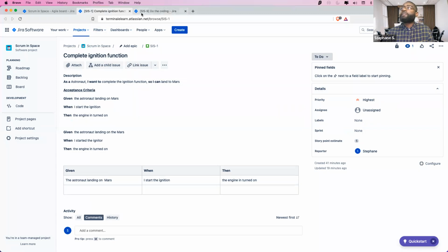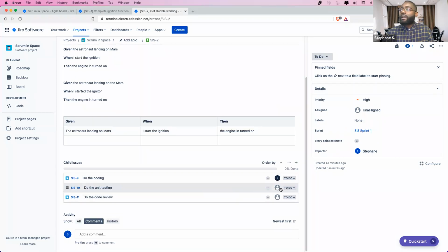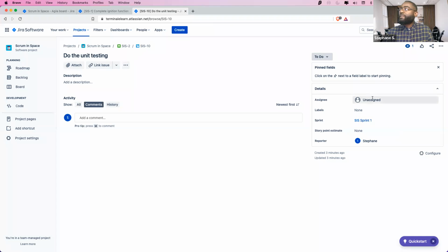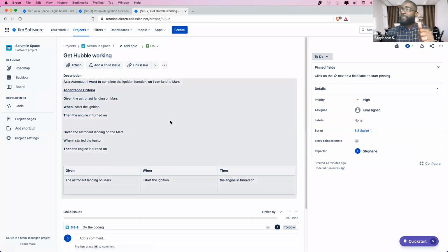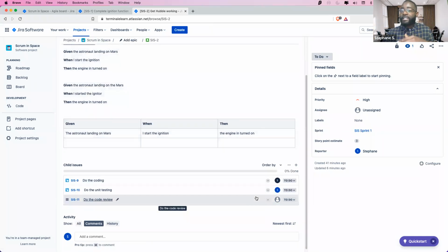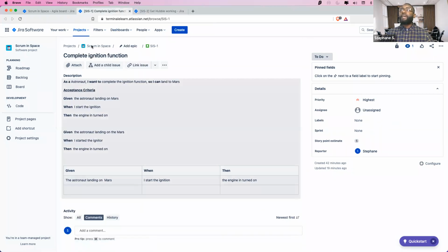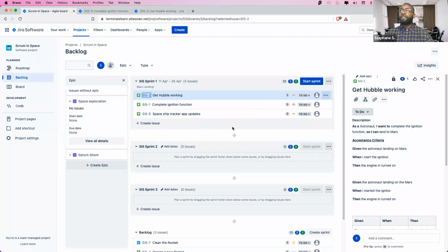What you see here, you have 3 subtasks, and then we assigned, at least we're going to assign it to different people. Okay, so that's what you're doing in the planning. So at the end of the planning, you should have all your stories properly documented, refined, estimated, have people assigned to it, have subtasks at the end of the sprint. That's why it's typically long, 4 hours maximum for 2 week sprints. Okay. All right, last thing, I'm going to assign it to me again. Okay. So then for that specific item, you basically are ready to start the sprint.